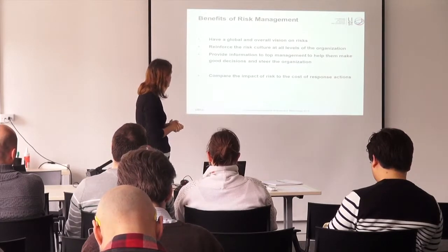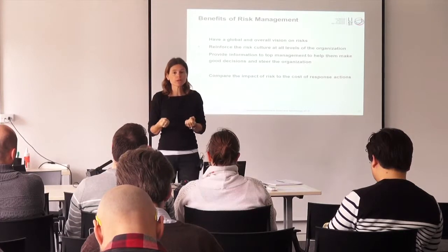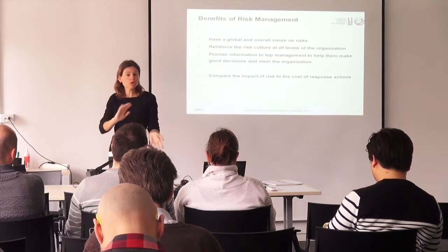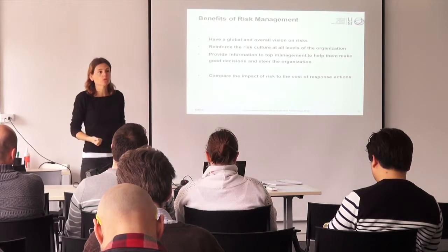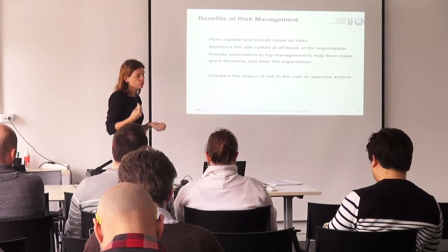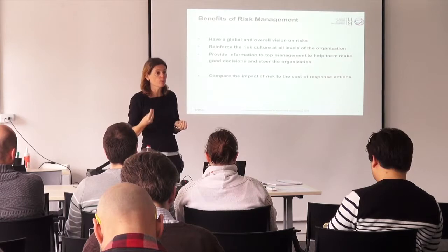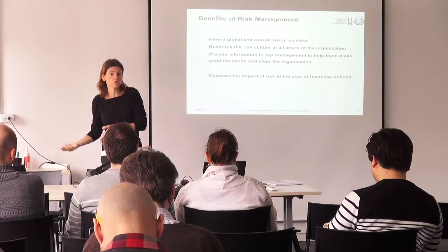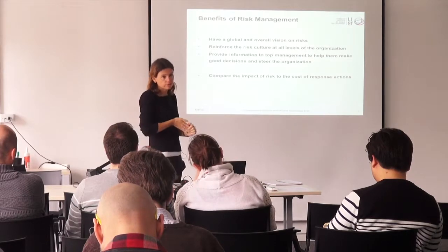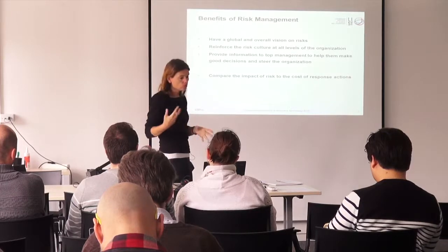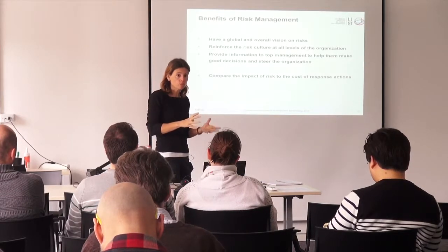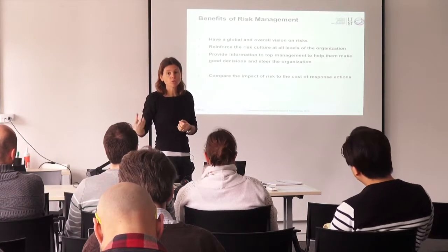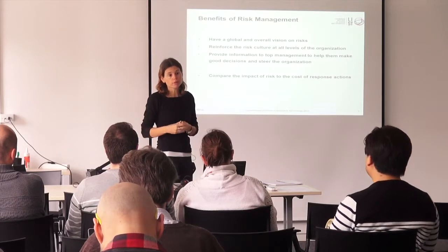And so, again, you can imagine that with risk management, you could spend all your time and money on the project trying to avoid risk and not doing anything on the project. But that's not what you want to do. So you have to find the right amount of time and money you want to invest in risk management instead of investing them in actual work and actually reaching the objectives. So it's always a question of what the risks would cost you if they occur against what the actions will cost you if you put them in place to avoid the risks.